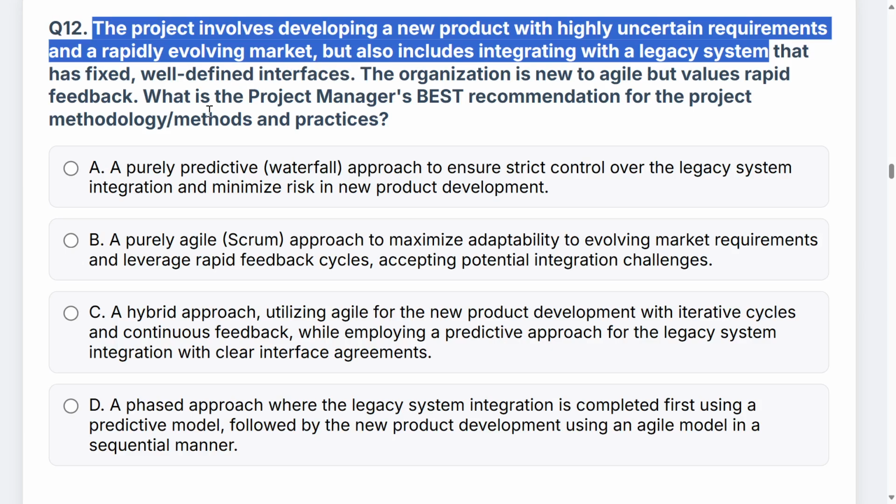With that in mind, you know that A will be outrightly wrong, to use a predictive, purely waterfall approach. That would not make sense because you have a new product. So, the fact you have a new product means you need to think some Agile.